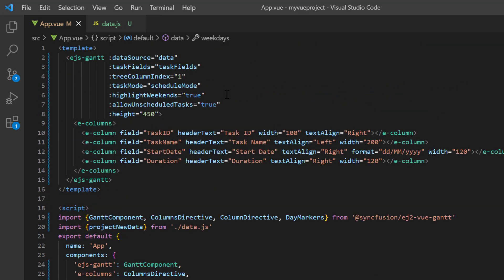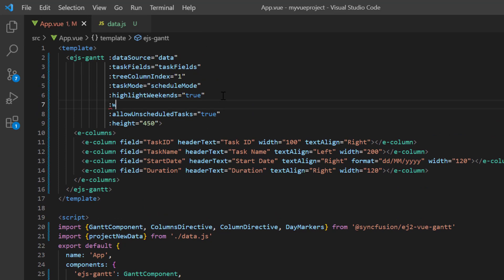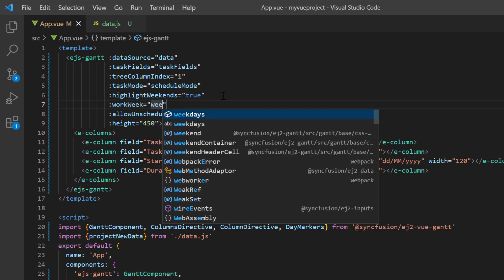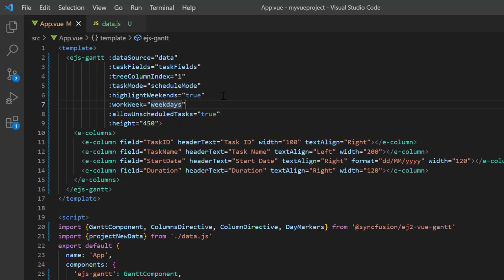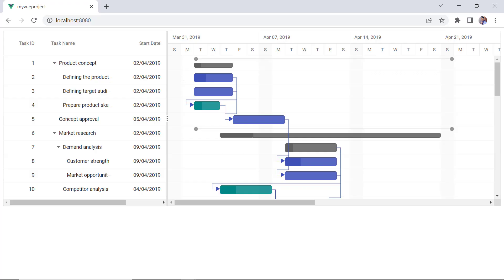Then assign this array variable to the work week property. Check now, weekends are highlighted and Saturdays have been included in the working day.